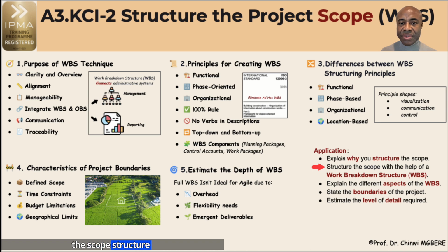Structure the scope using a work breakdown structure by choosing the right structuring approach and involve the right people. Verify that no work breakdown structure element includes activities or verbs. Focus on what will be delivered and not how. Help the team understand what makes a work breakdown structure effective. Show templates or samples from past projects to illustrate effective work breakdown structure usage.